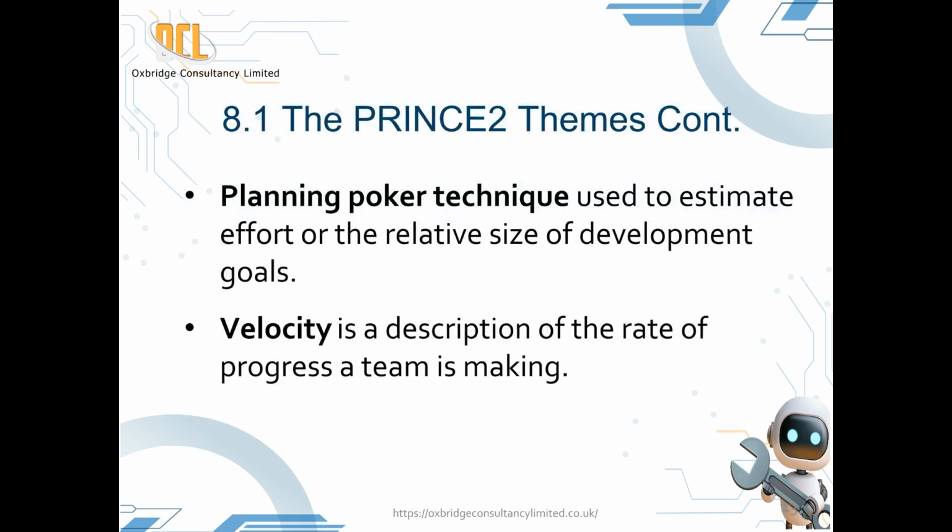Please note that planning poker is a technique used to estimate effort or the relative size of development goals. Each member of the development group selects one card from a set of numbered cards and places it face down on a table. The cards are revealed, and the estimates are then discussed.